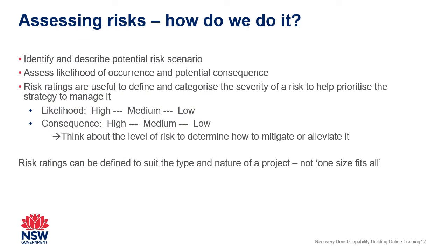So how do we assess risks? This process is very much about thinking through the logic of a possible risk scenario, with an assessment of how likely it is to happen and what the potential consequence may be if it were to occur. This is often a personal, subjective judgment based on your experience and knowledge.